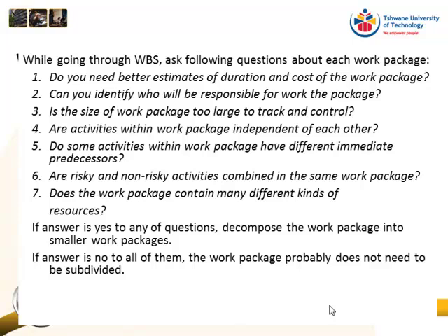Okay, so sometimes we can make work packages longer than that, but normally on a project we have weekly progress meetings with the project team. So 2 weeks is a good size for a work package, because I'll show you now. Because week 1 you say, okay, Alina do this, Lufuna do that, Kamiso do that.